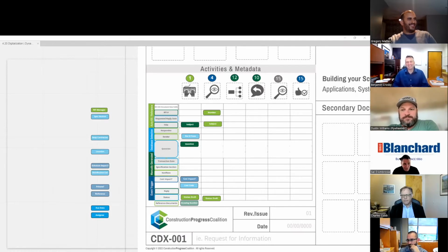So what's going through your mind? So that comes up in that dynamics, and different projects run different ways. And how do we address that? Because we had that conversation back and forth. Like for us, we've started calling it an issue from the trades, and then making it an RFI when it goes to the architect or engineer to keep that official status. But then it's the same sort of thing. Two different numbers. How do we link those together? And preferably so we don't even have to retype it.